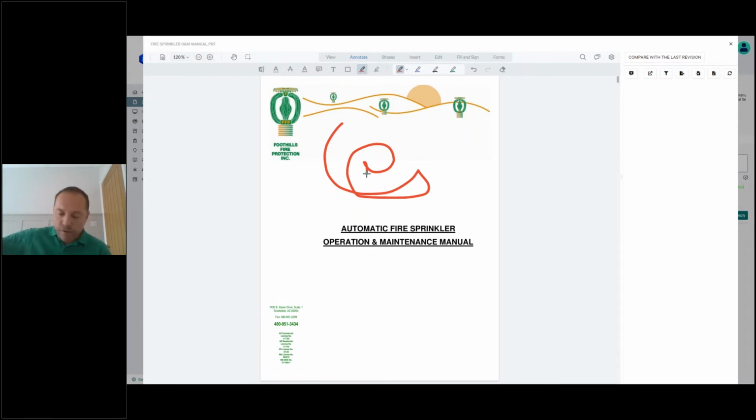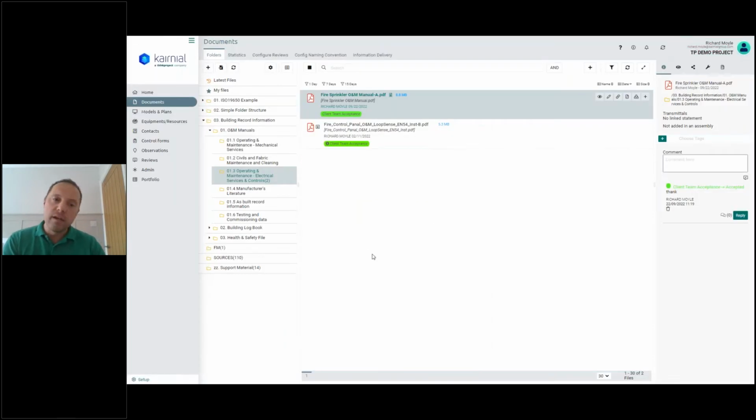So we're now seeing lots of our asset owners saying, okay, that's fine, deliver that project however you wish with whatever tools and CDEs you like, but at this point in time or progressively throughout the project, I want information coming into my environment that's structured in the way I want, named in the way I want, and I can then accept and approve that. And this is me progressively building up that digital asset record for that particular asset. Hopefully that makes sense, but again, we'll answer any questions as we go.